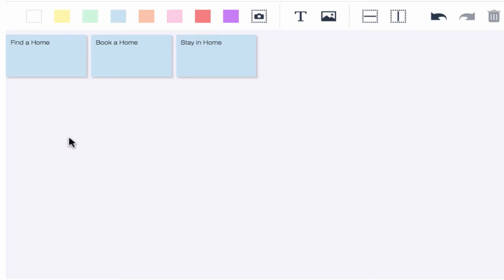And so the next step is to build out the body. And what we're doing here is sort of like taking a big boulder, that is your product vision, and then splitting that into a couple of pieces, which is the backbone, and then splitting those further down, and that'll be your epic or your activities, and then breaking that out further to get your user stories. So breaking it down until it's a manageable size.